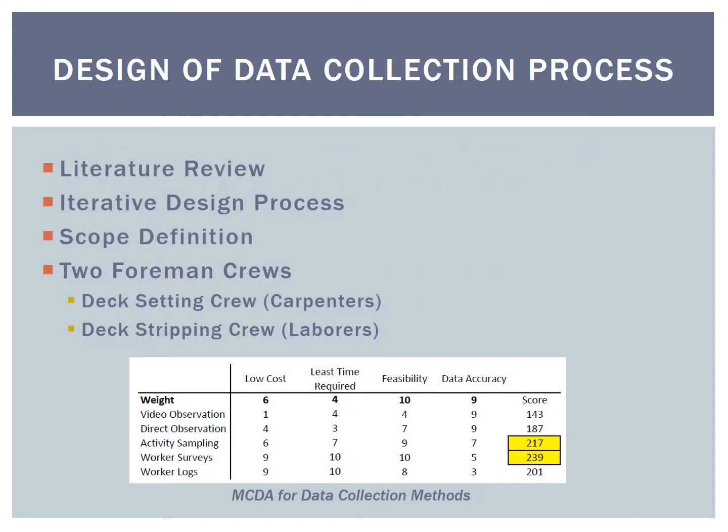The data collection procedure for this project was informed through my literature review. By researching previous studies done on construction sites, I identified 5 potential methods for collecting the necessary data. These were analyzed using the multi-criteria decision analysis shown, and activity sampling and worker surveys scored the highest and were both used for this project.